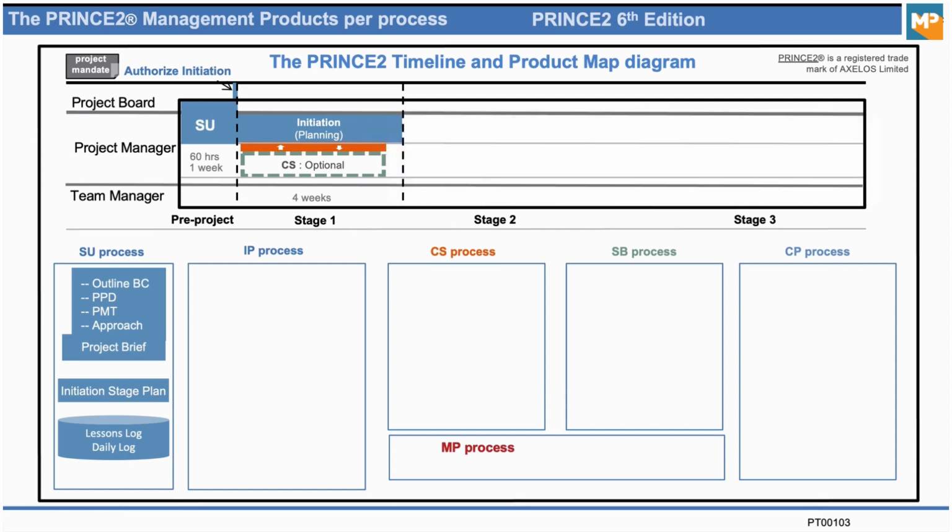All right. So now the first documents the project manager will create is, well, we will open up a risk register, quality register, and an issue register. And some of the information from the daily log, we'll copy it into here. Okay, that's the first thing the project manager will do.